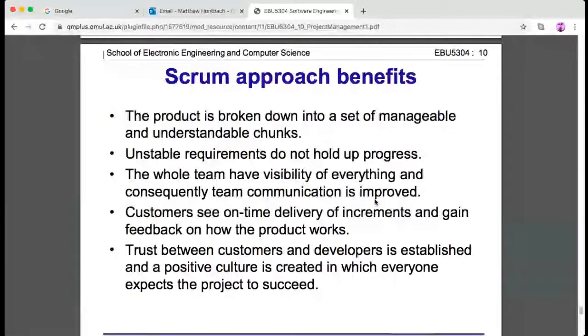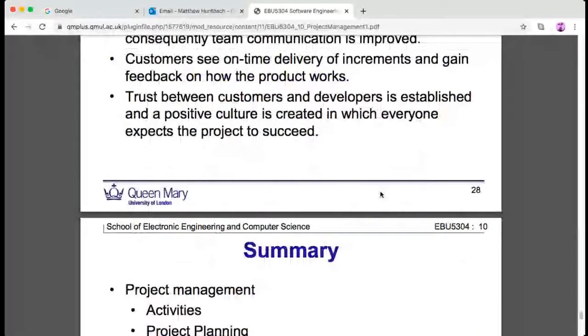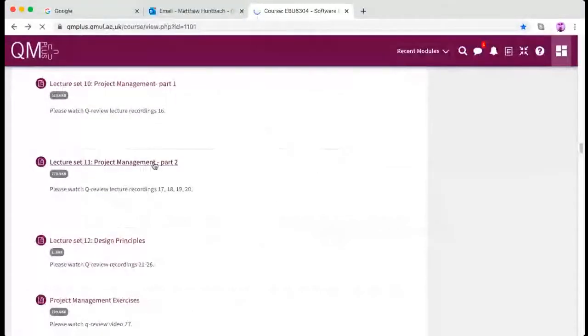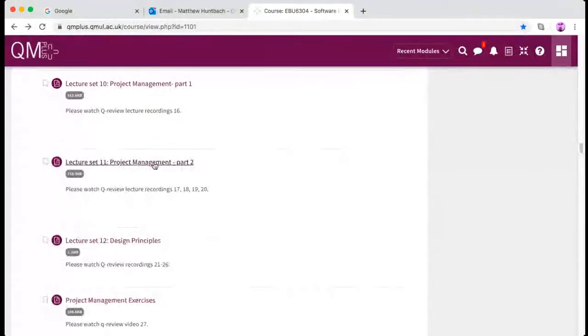Okay, so this is a chart of the various parts of the program that need to be produced and the estimate of the time it will take to do it. Some parts, of course, can only be produced after other parts have been produced, so that will affect the time, and that's what we're doing here. We produce particular requirements, and we allocate various tasks to various workers who are members of the team producing the code.